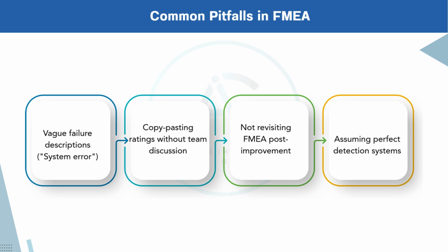Not revisiting FMEA post-improvement. After actions are implemented, FMEA should be updated, but often it's forgotten. If you don't re-rate severity, occurrence, or detection, you won't know whether your actions truly reduce the risk. This makes your improvement efforts incomplete.